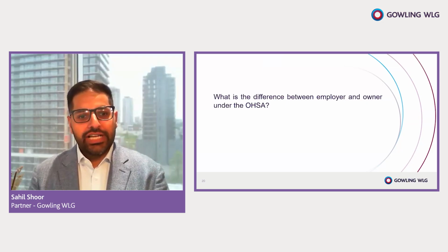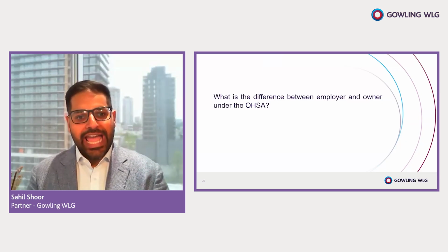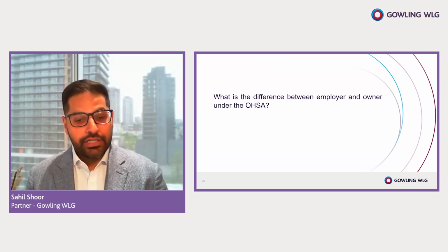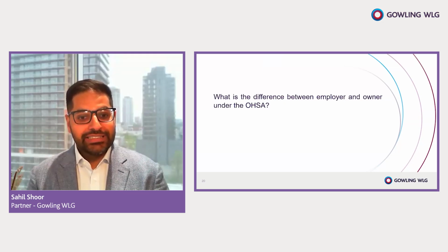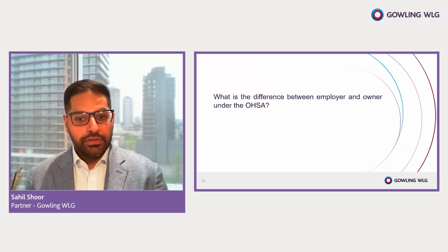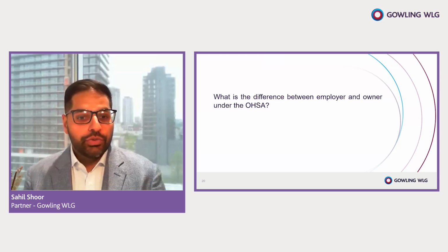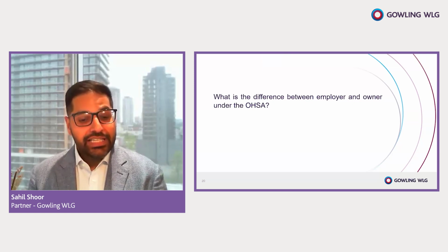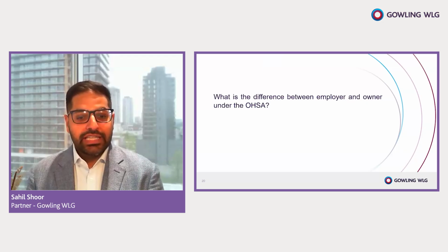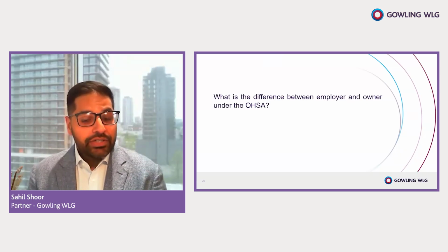And it wants to know that the person in charge has the ability to make sure that it's a safe project. So our job in our contracts, in the project structure and in project management is to make sure that those lines and responsibilities are clearly defined, and that they clearly assign the role to the stakeholder who is best placed to take on that risk. The first part of that is being clear about who is the constructor. In our contracts, and even without a contract, you would want to make sure that the person in charge of health and safety is clearly assigned the role of constructor under the contract, and that they have accepted that role. You would also want to make sure that they have the experience, the resources, and the bandwidth to manage that role.